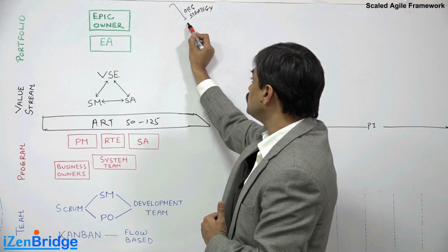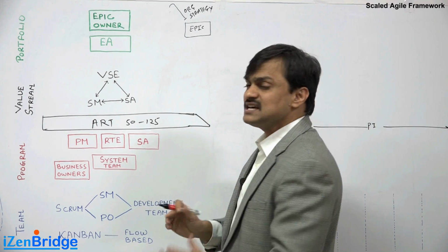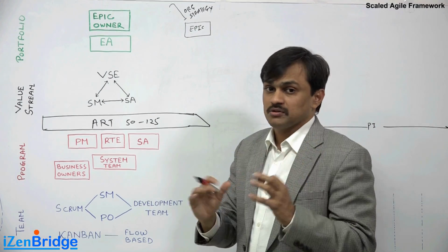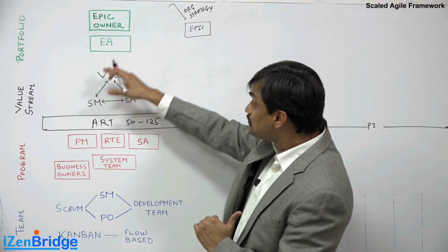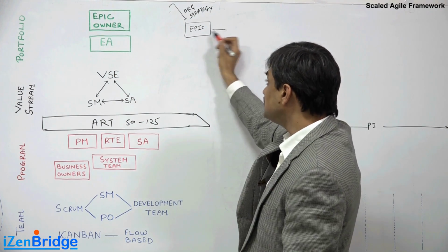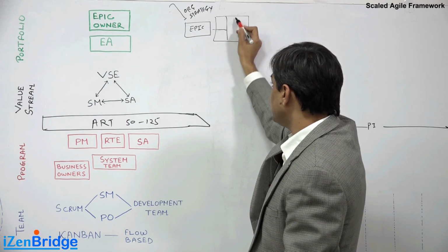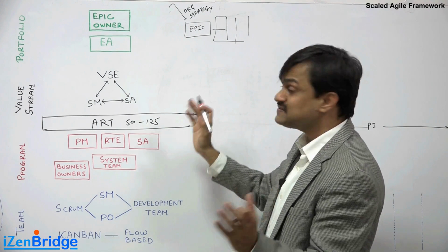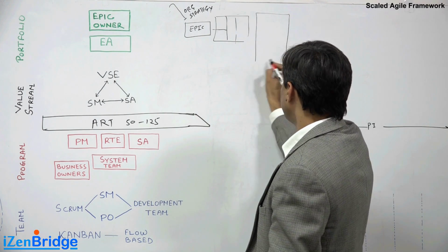So at a portfolio level, we use a term called epics. Epics are big initiatives which require a sufficient business case and understanding. Before I commit to one, I should be able to see that it makes sense. There are people at the portfolio level, program portfolio management level, who take each epic through multiple review stages, which we manage through a Kanban board in order to create visibility. The things which get approved, that is, the big initiatives that can go ahead, rest in the portfolio backlog.